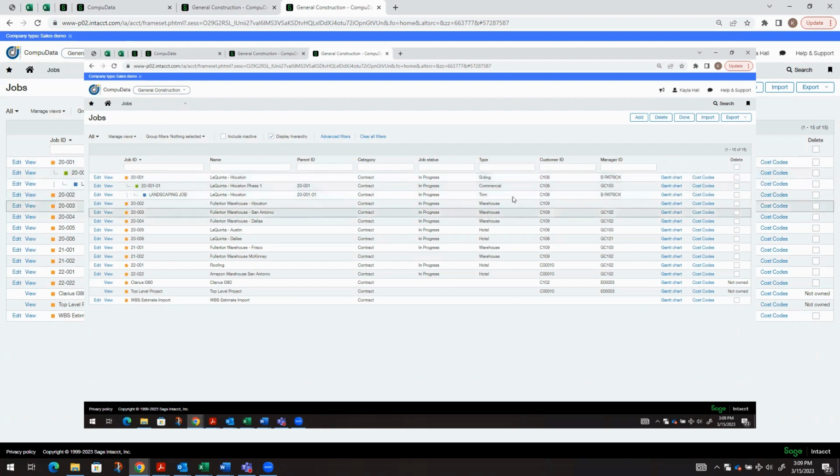We also have a lot of flexibility in custom fields on a project to better manage. So we can categorize the top one as a job. If we wanted to call this one a work package or phase, we could do that. And then we could have an extra or a sub-project labeled for the 3rd tier. And then we can create restrictions based off of that.